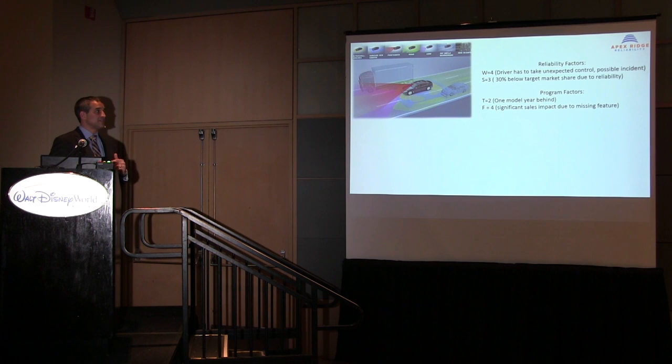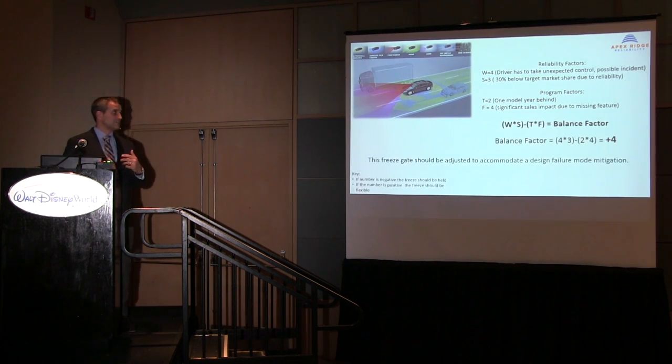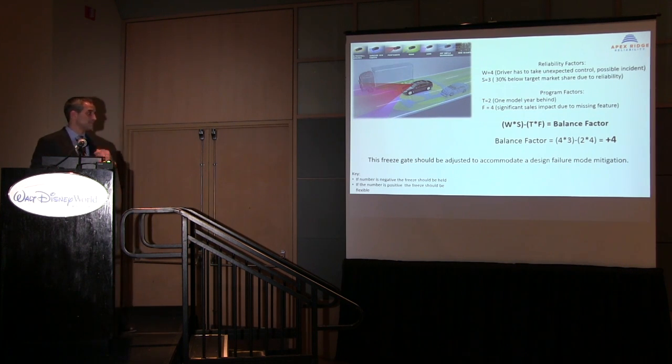So putting these together, we end up with a balance factor of +4. So the freeze gate should be adjusted to accommodate a design failure mode mitigation because it's a positive number.